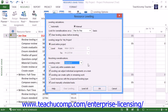Next, if you want to allow the leveling to only use the available free slack within the project file, then select the Level Only Within Available Slack checkbox. This choice is most often unchecked to allow Microsoft Project to extend the finish dates of the project to resolve over-allocations. Often, there is not enough free slack in a project file to allow for resolution of over-allocated resources without extending the finish date.